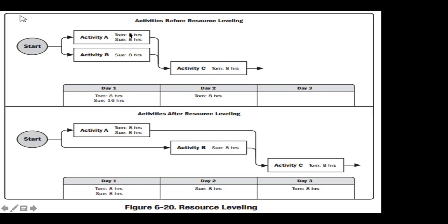Because it needs 8 hours plus 8 hours, we are completing activity A on day 1. Then we have to do activity B, because you have to complete A and B to start C. You push activity B to the second day.